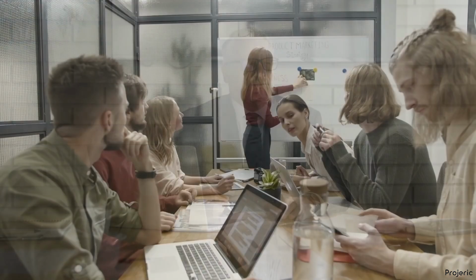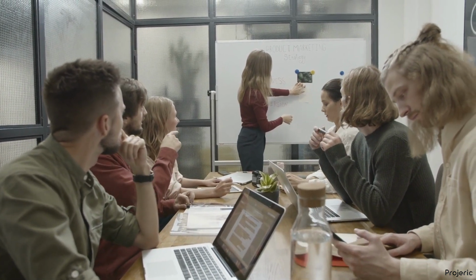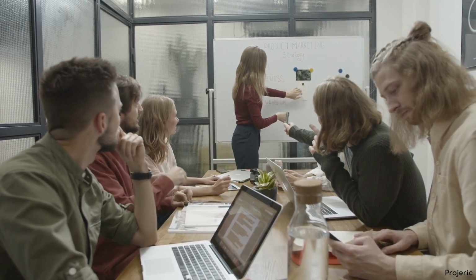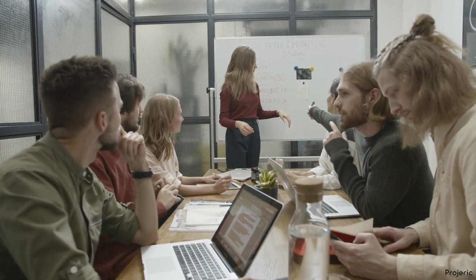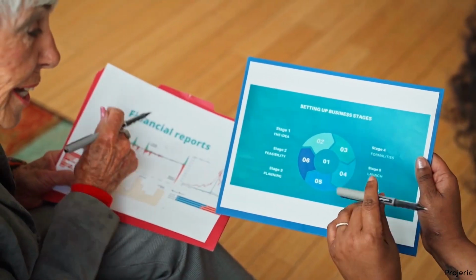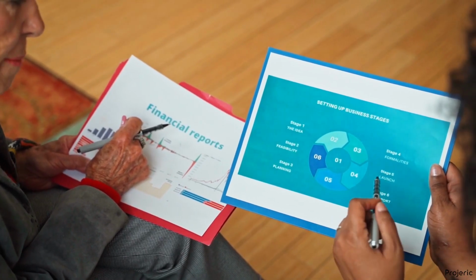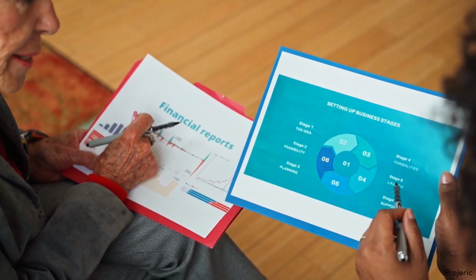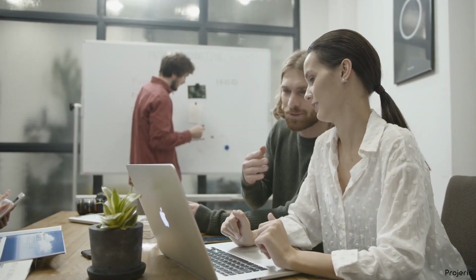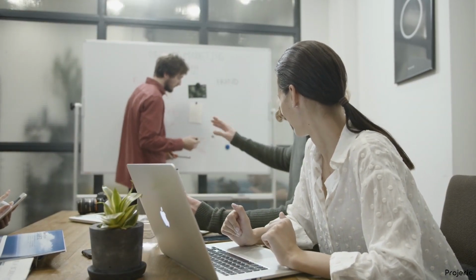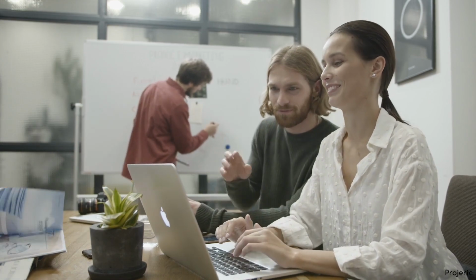With the business case developed, the project sponsor decides which, if any, project alternatives to undertake. If the project is undertaken, the business case becomes a reference document that will be used by the project manager and the project team throughout the project. Project managers should ensure that the project remains aligned with the business case and will deliver the intended project outcomes. If new opportunities are discovered as the project progresses, the business case can be updated to capture them.